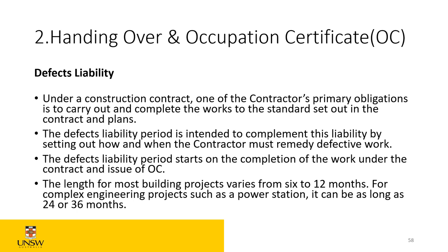The length of the defect liability period for most building projects varies from six to twelve months. For complex engineering projects such as a power station it can be as long as 24 to 36 months. These are for minor defects. For major defects we're talking about six years. So a builder who builds a house — even after the 12-month defect liability period — if there's a door handle not working, a lock issue, touch-up paint needed, or carpet defects, that's the one-year period. Major defects — waterproofing, structural defects, cracking, leaking — require six years warranty.